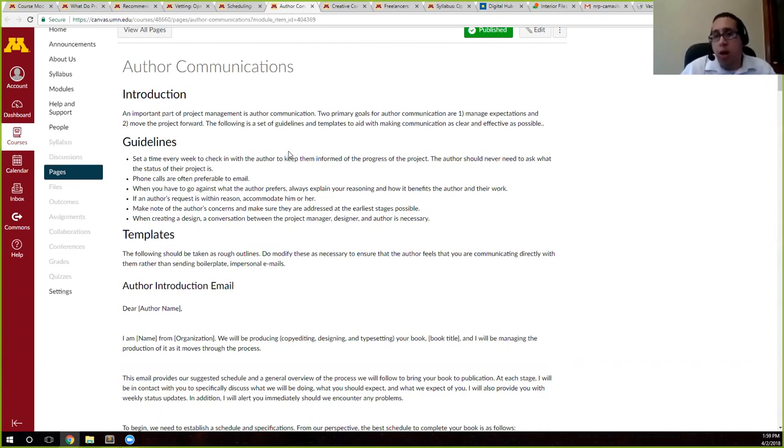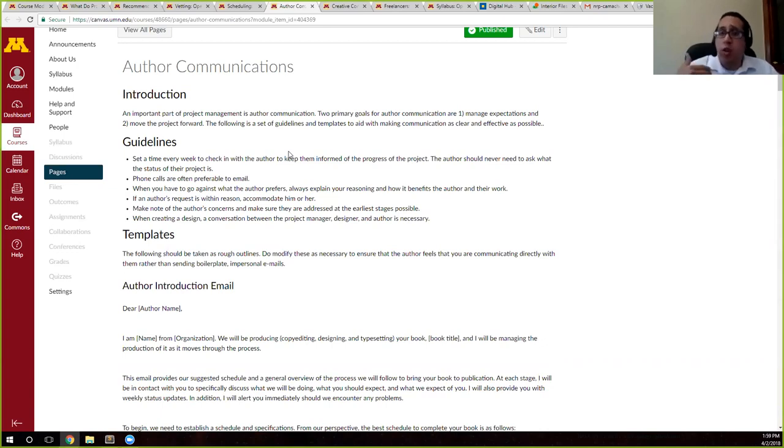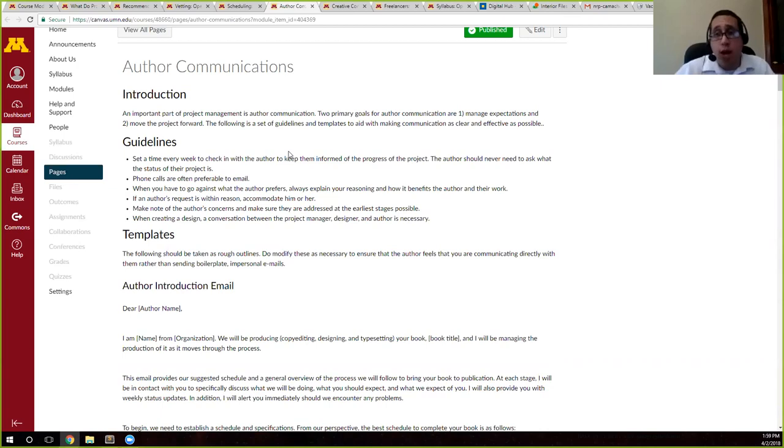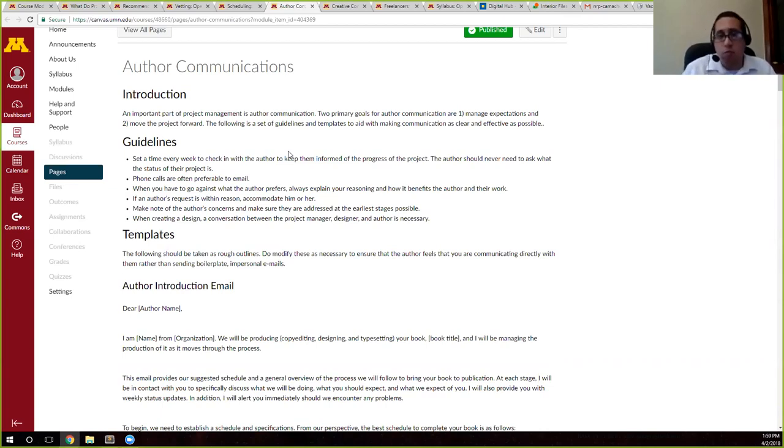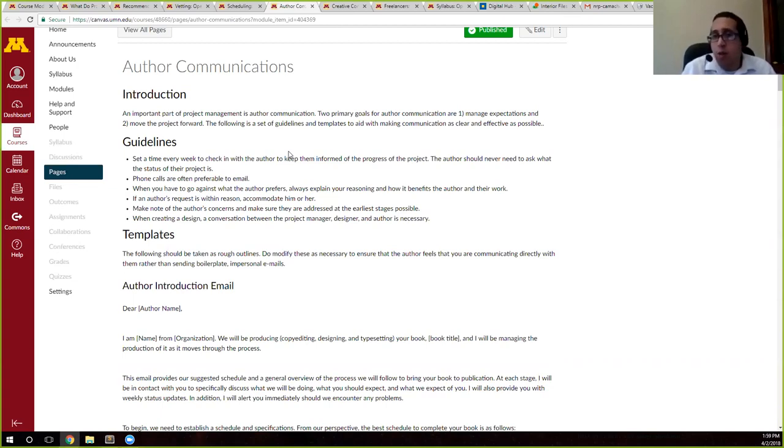As project managers, that's our responsibility, and you can do this with your authors. You can have this conversation and say, hey, look, if they're still writing their manuscript, on Wednesday, every Wednesday, give them a call or send them an email if they can't always respond and say, hey, just let me know where you're at.